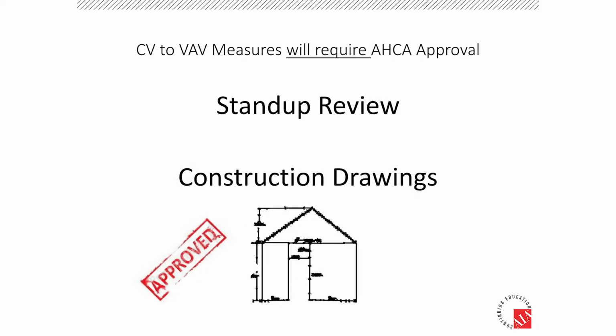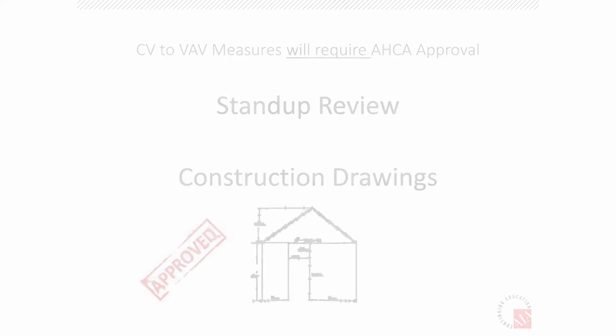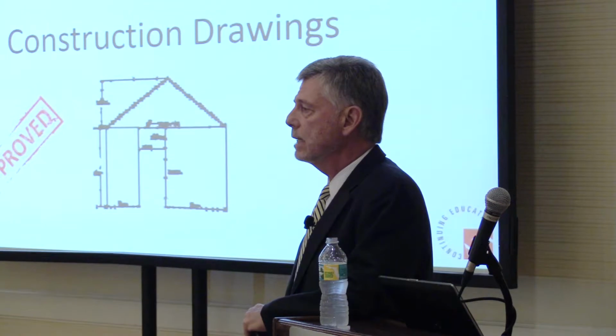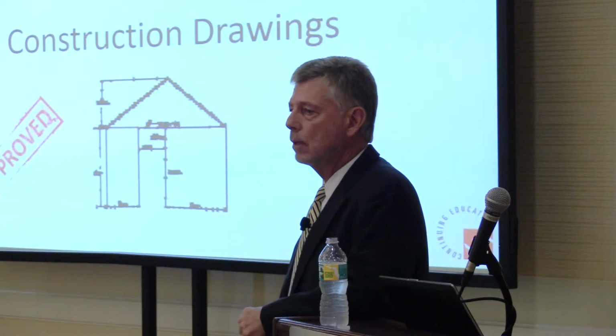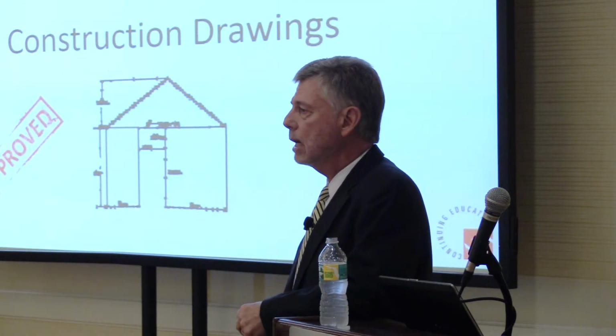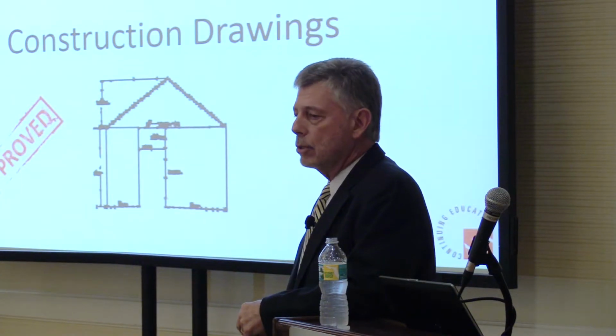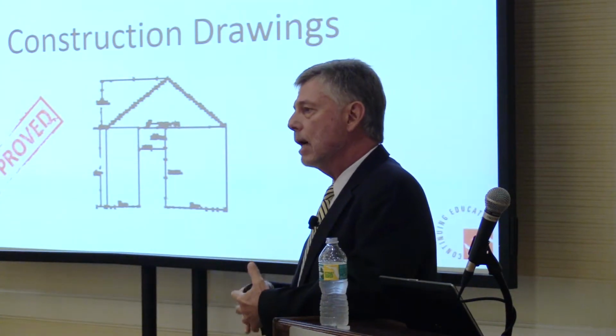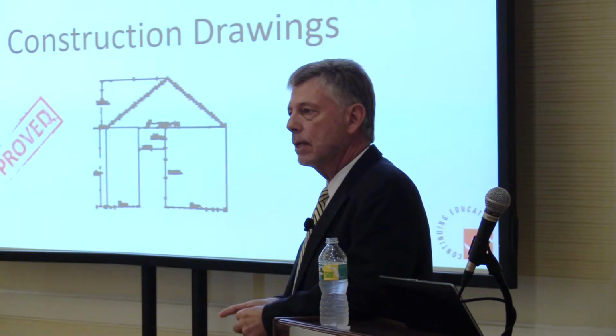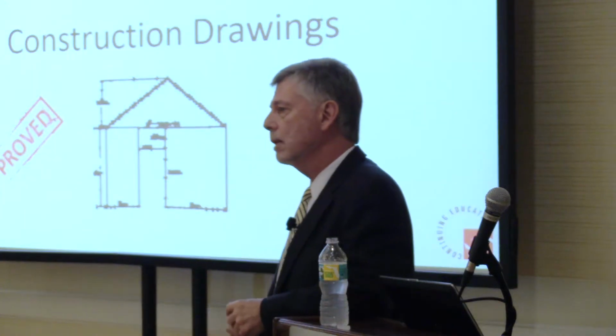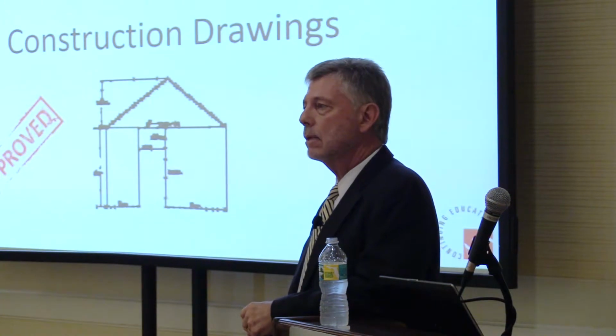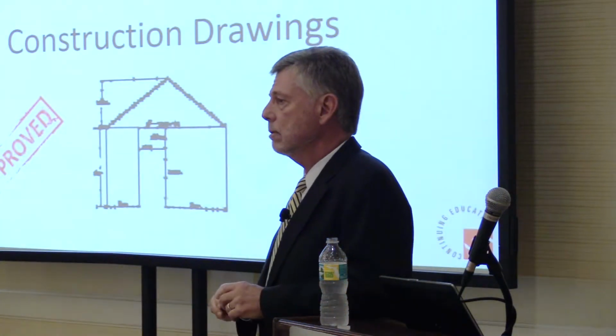So it does require a stand-up review, which means that construction drawings have to be developed. And then they have to go before AHCA in a face-to-face setting and have those documents approved. On our first engagement, we came to the AHCA office here in Orlando and presented our plans, and one by one the boxes were discussed, the spaces were discussed, and they approved most of the zones that we identified in those 17 non-sensitive areas.